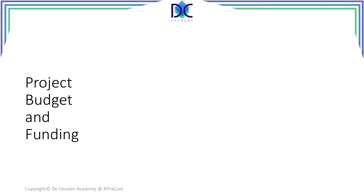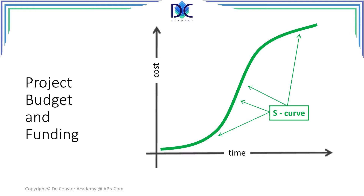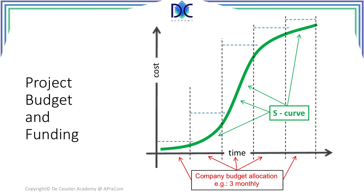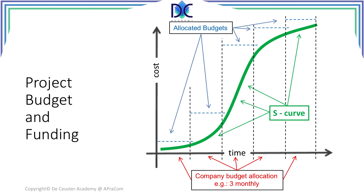Let's look at the project budget and the funding. First, we have the S-curve — the green curve showing the spending of money over time, and this curve looks like an S. Now the company will allocate budgets over a certain period. Here we have vertical lines indicating the budgeting period. For every period, the blue line shows the money that you have available to work on your project — this is the company budget allocation, for example every three months, or it can be less or more depending on your company policies.